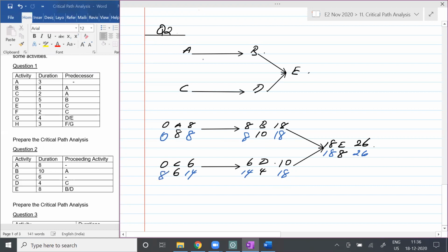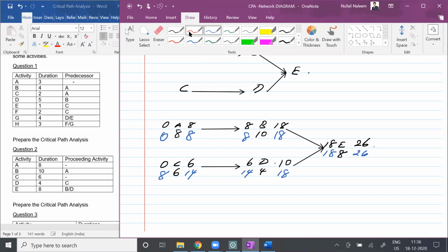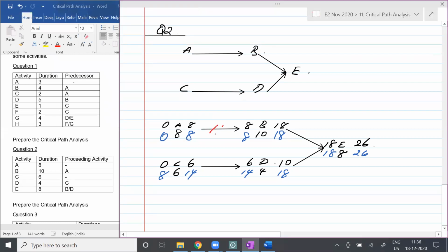Agree? So students, now can we identify the critical path? A, B, E. A, B, and E, correct? Yes. So if you see C, this route is not critical. So I'll write down here A, B, and E. Any questions here, Malik, on the critical path? No. Is that fine? So students, now the box method is very logical, right, Malik?